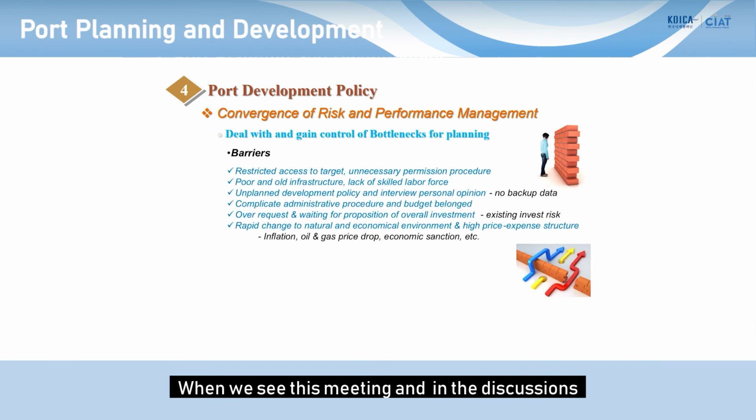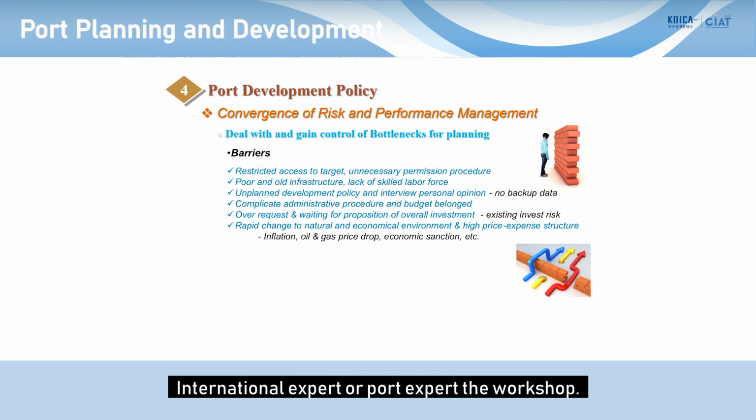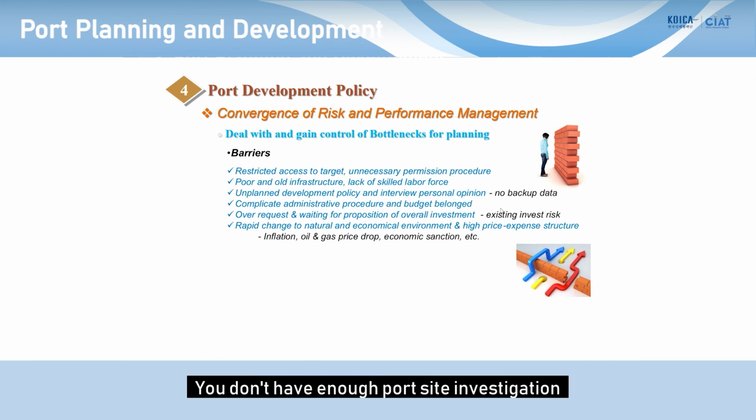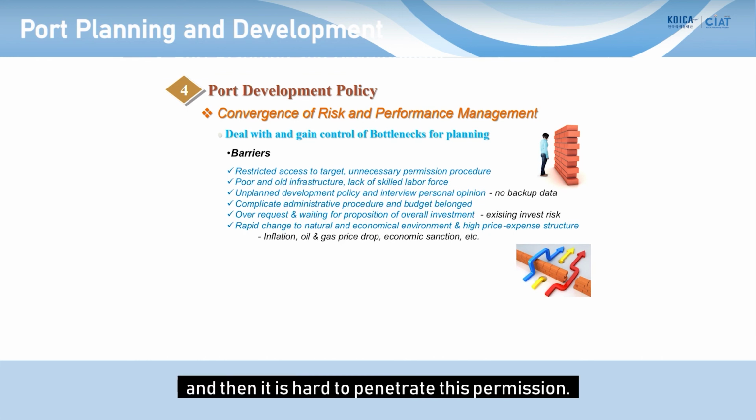When we had this meeting and discussions with the participants of the International Port Expert Workshop, of course, there are numerous barriers for port planning and development countries. All these barriers: you don't have enough data for site investigation, and it is hard to find skilled labor force over there. And in order to assess a certain target, it is hard to assess there. So unnecessary permission procedures come up, and it is hard to get through this permission.